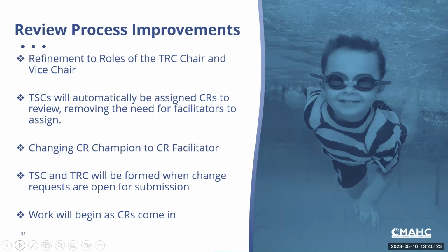Similar thing happened with the 4th edition, where the submission window was June to January. We stood up the committees in April. We immediately got shut down for the pandemic. And then late May, early June, started work and had to complete it by August to meet our 60-day second public comment window. And that was very, very tight and very difficult for all involved. So by elongating the review process to coincide with CR submissions, then we're actually putting less stress and wear and tear, so to speak, on our volunteers.